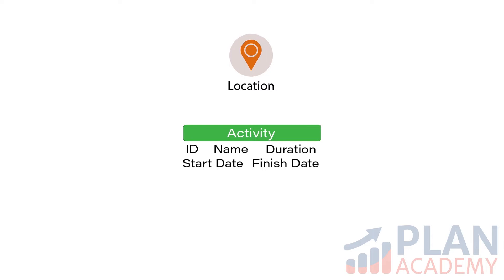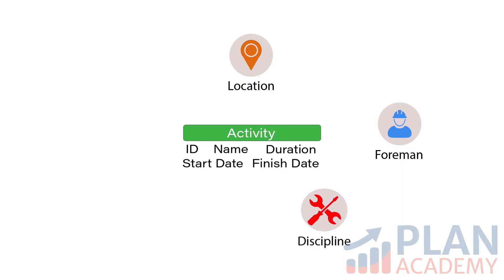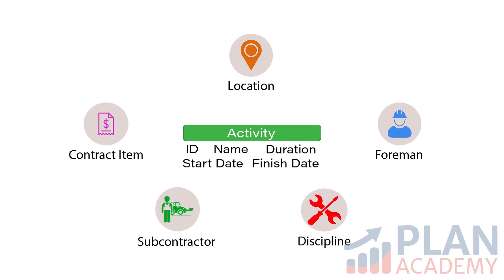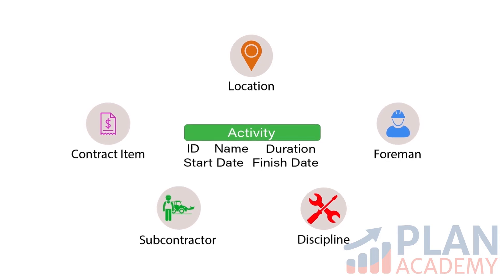What if you really wanted to track which activities are assigned to your three foremen? Just add your three foremen to an activity code and then tag your activities appropriately with each foreman. What about identifying which trade owns the activity, or maybe which subcontractor? What about linking project activities to contract items from the bid? These are only a few examples of additional information you can add to your schedule using P6's Activity Codes.